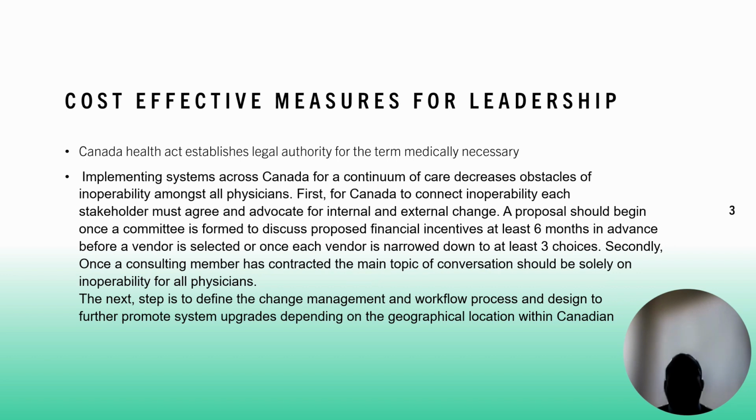The most important part of this implementation is cost-effective measures for leadership. Implementing systems across Canada for continuum of care decreases obstacles and improves interoperability among all physicians. To connect interoperability, each stakeholder must agree and advocate for internal and external change. A proposal should begin once a committee is formed to discuss proposed financial incentives at least 6 months in advance before a vendor is selected, or once the vendors are narrowed down to at least 3 choices.